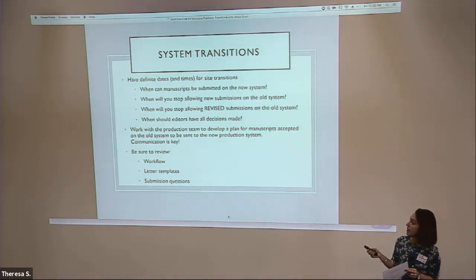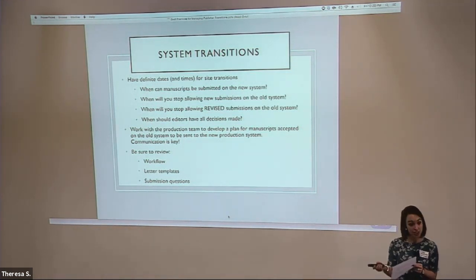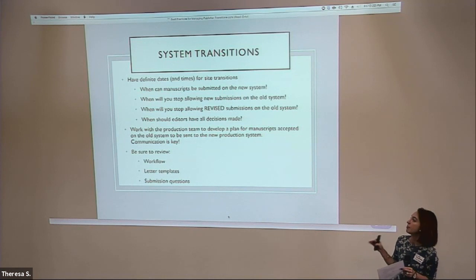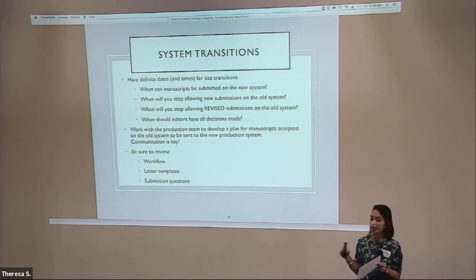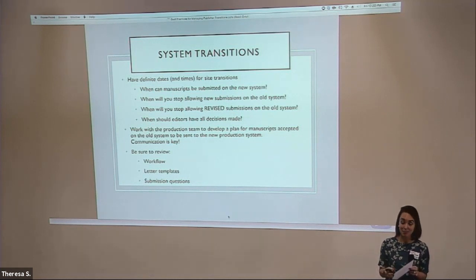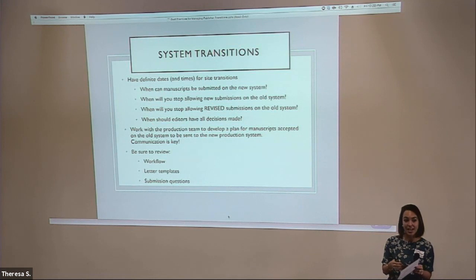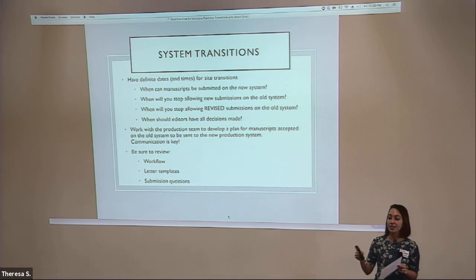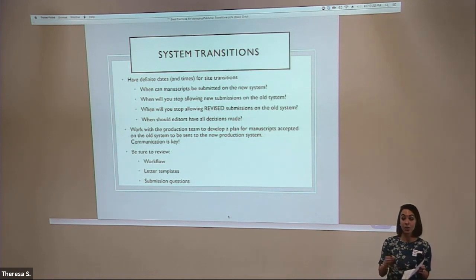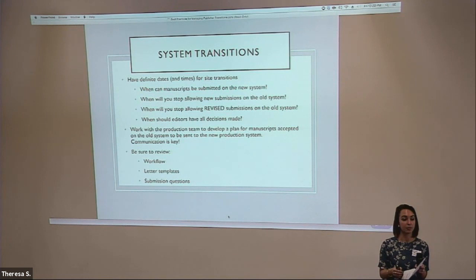I would really recommend working with your production team — both your old publisher and your new publisher — to develop a plan for manuscripts that are accepted on each system and how to move forward. Most likely you're going to have papers accepted in your old system that will have to be published by your new publisher. Develop a plan for how your new publisher is going to receive those manuscripts and how they're going to be tracked.